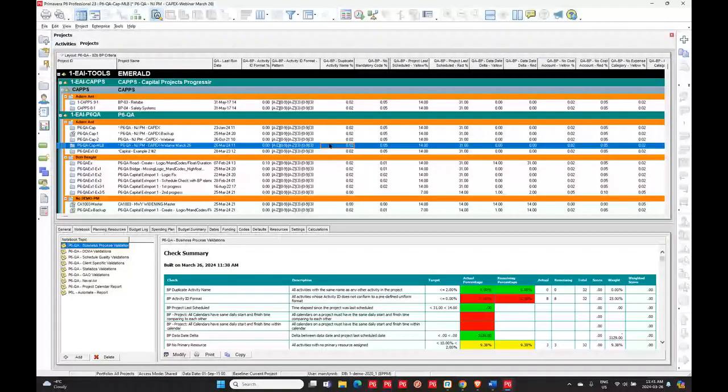I've worked turnaround schedules where when I first looked at the schedule, you have 200 or 300 activities that are all named erect scaffolding as an example. That's not helpful, because if that goes out to the field like that, chances are your updates are not going to come in correctly, especially if there's no other column right beside it that's supposed to tell the field people exactly what that pertains to.